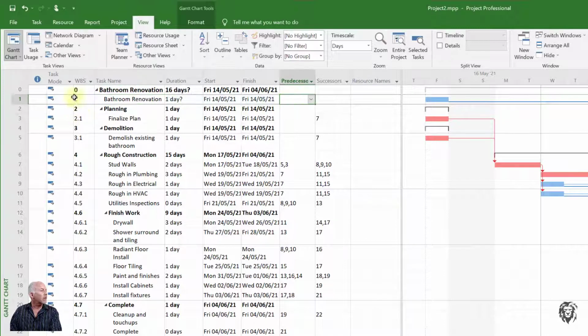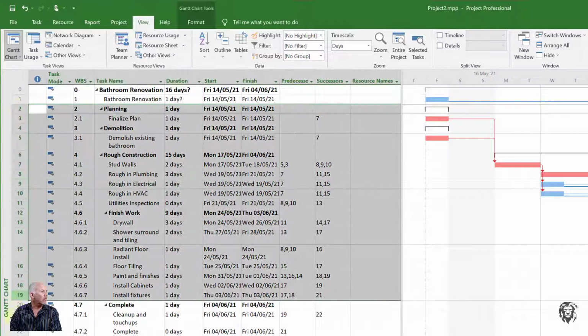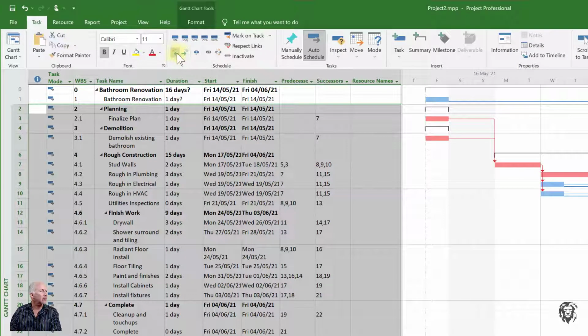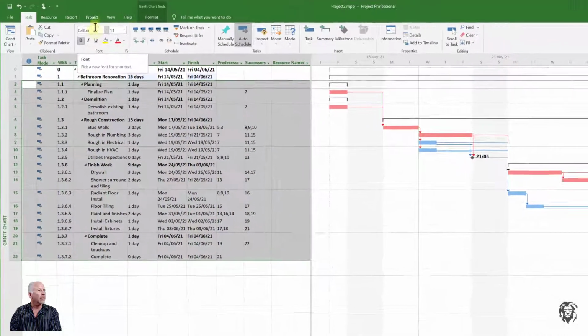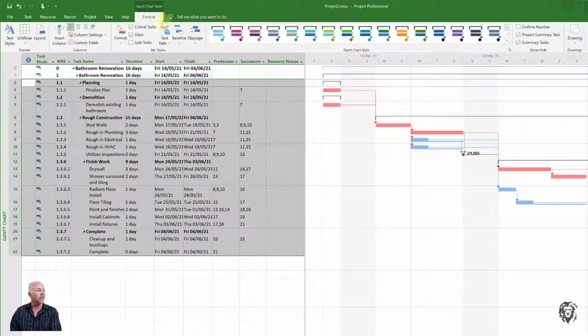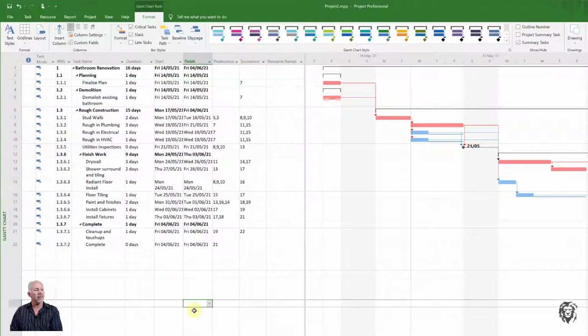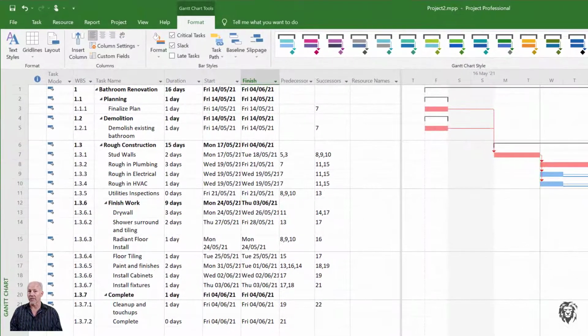And there we go. We're going to make all of this subordinate to it. So I'm going to indent it under tasks. I'm going to choose indent. And you see our work breakdown structure has been adjusted. And then I'm going to go back to our format tab, and I'm going to turn off the project summary task. And so now we've basically provided our own project summary task in here, because in this case I've chosen as my method to assign some resources directly to the project overall. And so that's going to allow me to do that.